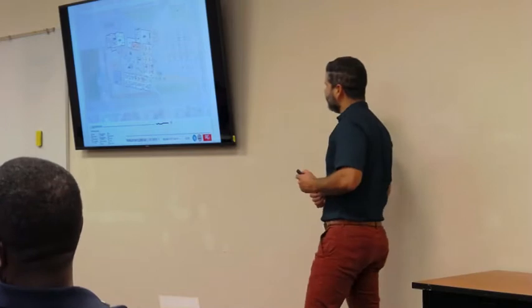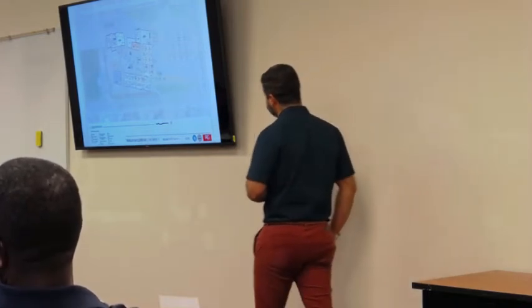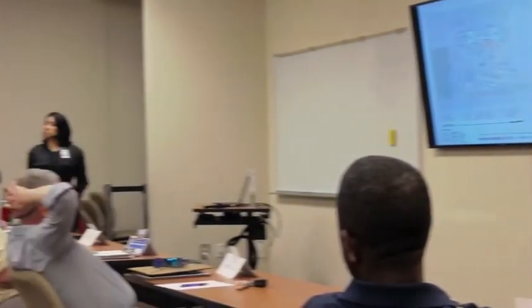What we're anticipating doing is, we asked to come to this meeting to get your thoughts on the two designs we narrowed it down to, with a preferable final design that he'll show you eventually. The intent was to get your feedback, see what you think, ask questions, have us answer those questions, then bring it to the superintendent and his executive staff to take a look at where we're going. Then if they're okay with that, we would get some local community members. One person who's very intimately involved in the community is Jerry Weir. And we'd have a small, intimate discussion with the principal of what we're doing, what we're presenting to you.